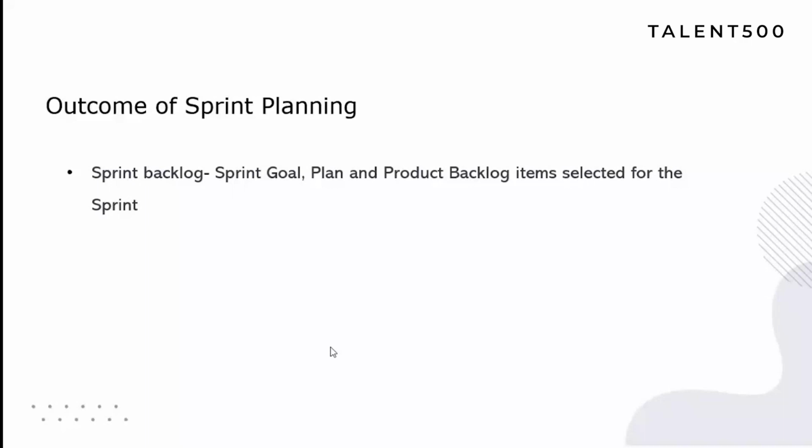And when I say you, it's not you as a Scrum Master, it's the team together, the Scrum team together. And if the new item is not aligned to the sprint goal, then that item goes directly back to the product backlog. This way, your plan becomes flexible. Your items can change, but your goal should not change. So remember that whenever you're doing the sprint planning, you're discussing these things without fail as a Scrum team.